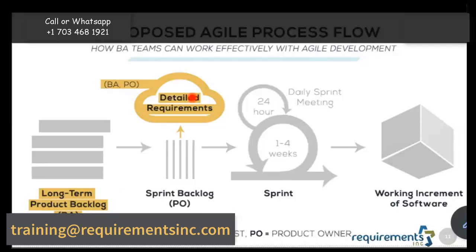Okay, so grooming meeting is when the product owner definitely, the Scrum team definitely, and any other stakeholders that need to be in there, they participate and they look at each story, and that is where the sheets, the user stories, are made. So in those meetings, you pick up something, right? Okay, this is a new box because it's just a suggestion, right? Nothing exists in there. You take every box that has nothing in there and then figure out, okay, what different user stories are needed to achieve that feature.